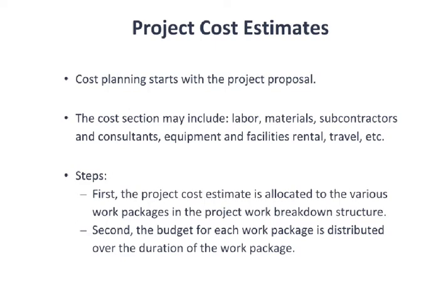We need to have that distribution of the work over the activities, over the work packages, financially speaking, the distribution of the money and the work over the activity, in order to be able to tell if we're tracking right with time. Remember that when we collect actual data, we're going to collect data at a snapshot, and that snapshot may be halfway through an activity, and we have to know how much money we should have spent up to that point.